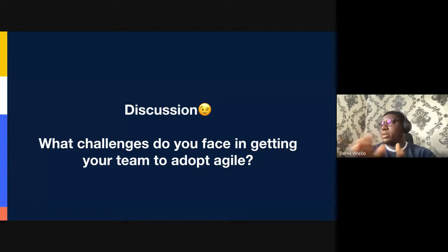So you do a spike on them first, and your QA testers do a spike on them to know where exactly the problem is coming from. Once that has been done, you need to assign story points to those bugs based on the level of complexity in fixing them. That's the first step. The second step is, if for some reason you need to, and we'll talk about choosing Scrum versus Kanban, because you find out that sometimes you probably are using the wrong framework. I don't know if that might be the case, but that happens a lot.